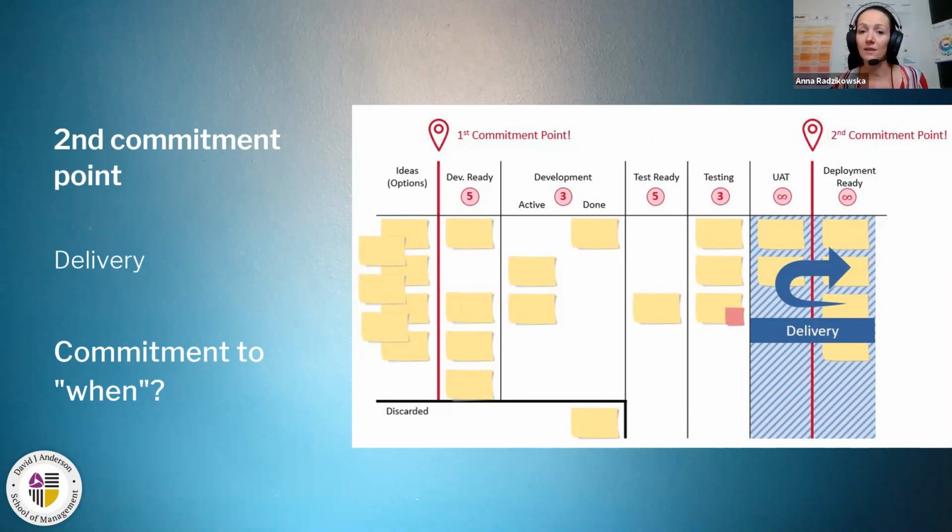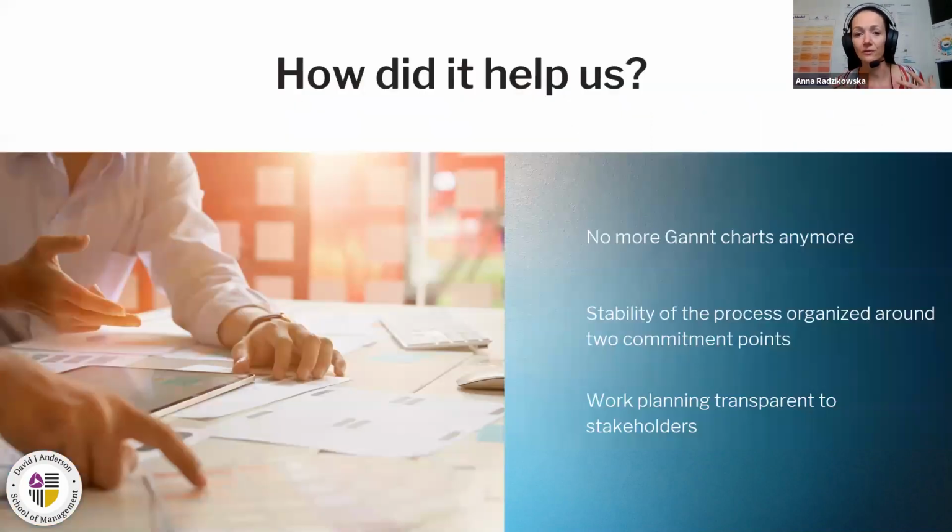And this is also how we established our process after these 7 months of fighting. On one hand, we stopped telling our business that we will deliver this in 2 months on this particular Saturday at 2 p.m. No, we just said that, guys, we start working on it because you requested it. We understand the requirements, you approved the requirements, we all know what we are going to do. And then when we did the testing, we started discussing when the deployment date would be.